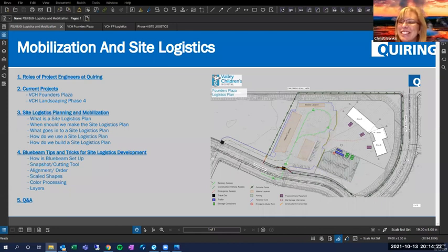Well, it also helps the estimating department. I don't know if Garrett's still on or not, but if they see that we have a particular way that we think it needs to be built, they now know what they need to bid. Just looking at that logistics plan that Sam was showing, what I picked up on is you're moving the fencing about 3 times into different orientations, right?